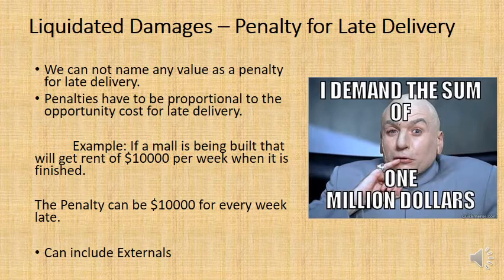Drivers aren't going to pay money every time they go on the motorway, but there will be an external cost. The economic stimulation that the motorway will provide will be forsaken for another week if the project is delivered a week later. So if you can quantify those externals, remember we talked a little bit about that when we talked about feasibility studies and cost-benefit analysis, those external opportunity costs can be the basis for a penalty.